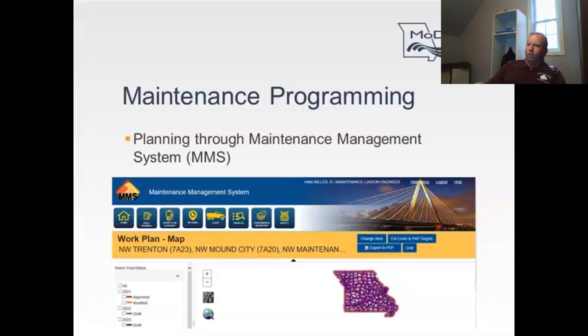But in 2013, we initiated a program that was available with FHWA called force account, or in-house, using our own staff, for preventive maintenance work on our system. That can include chip seals, asphalt pavement repair on relatively good pavements, definitely bridge seals. FHWA participates 80% in those efforts that are performed in-house.